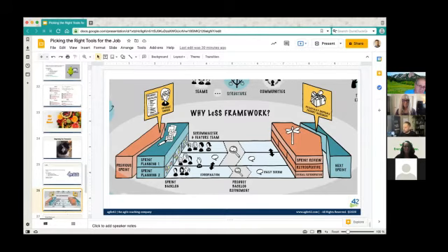And you can kind of see each of these teams is working, but they're all tied into the similar sprint planning, and they get together and do a collective review and an overall retrospective. They have one product owner and one potentially shippable increment, right? So again, if you go, well, I've got 4 teams working on delivering this product, but it's one product, and I don't want a ton of overhead on top of it, I just want these 4 teams to work together, maybe it's a great fit for exactly what you need.